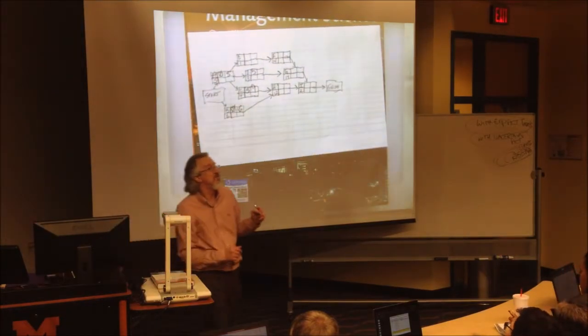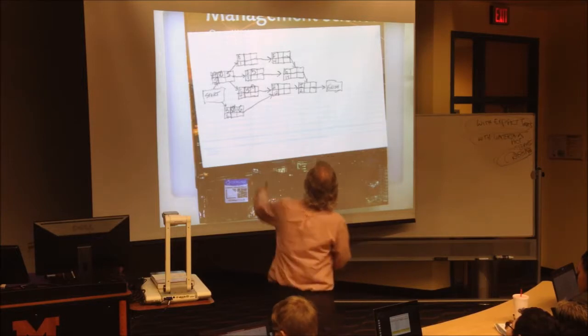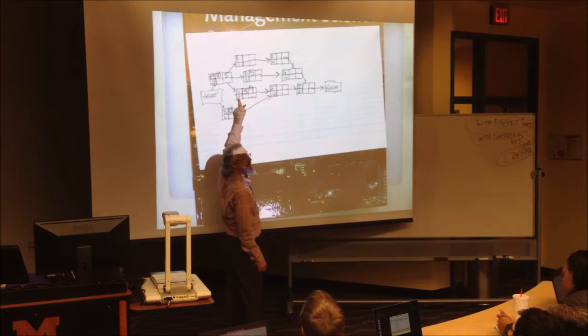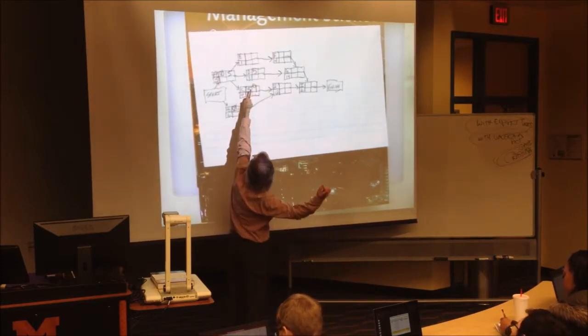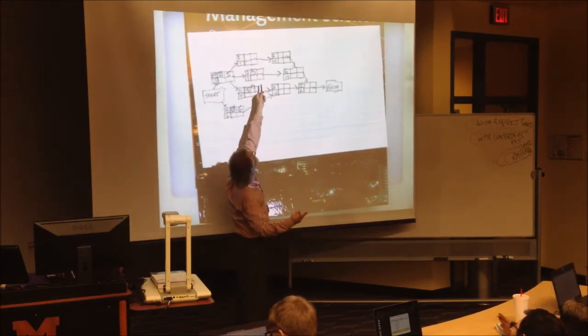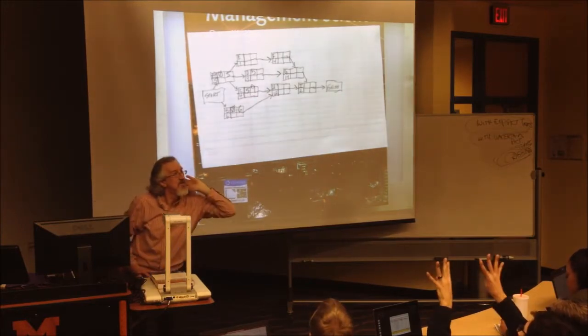This ends at 5, and then you add the amount of time it takes, so it's going to be done on day 9. Help me right now with D. D has to start on 5 because A doesn't get done till 5. Tell me when D will end. Day what? 8. Very good.